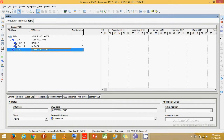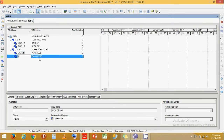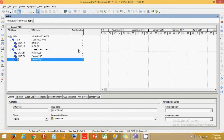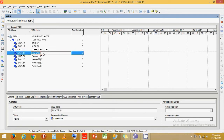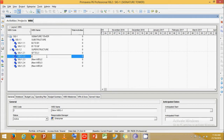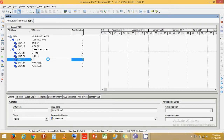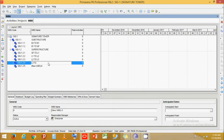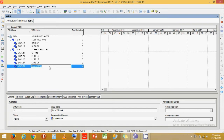Under Super Structure, let's create five more levels. Click Add multiple times. Name them: Ground Floor to L1, L1 to L2, L2 to L3, L3 to L4, and L4 to L5.